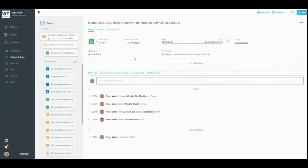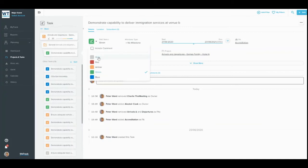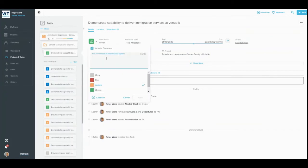You can edit a task or subtask's RAG status wherever you see it. Simply click on a RAG bubble and select a new color. You can include a comment if you wish. If you're changing the RAG status to red or amber, leaving a comment is mandatory.